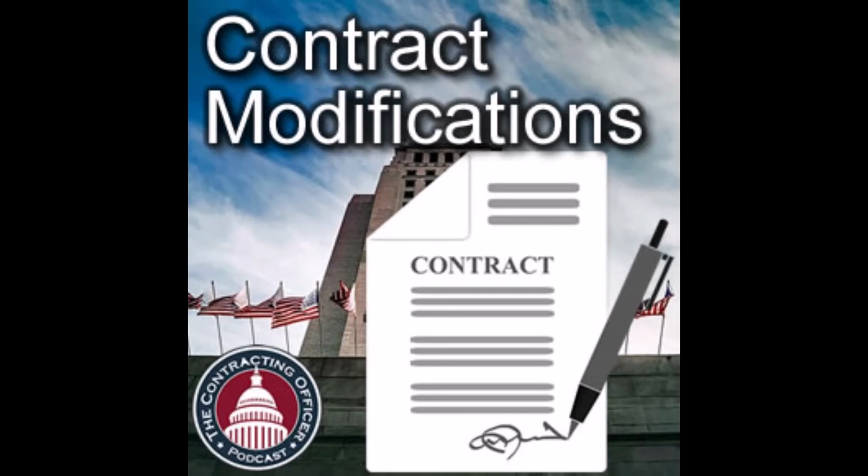Yeah, and I got a great story for this one. The example would be that we were adding one person to the contract because we increased the services on some IT support. At the same time, we were adjusting how they were going to be managing the cybersecurity on another part of the contract. Those are two very different things, but you put them in the same mod, and all of a sudden it's like, well, wait a minute, this easy thing's not getting done because of this hard thing over here that it's attached to in the same mod. So there's an art to this.